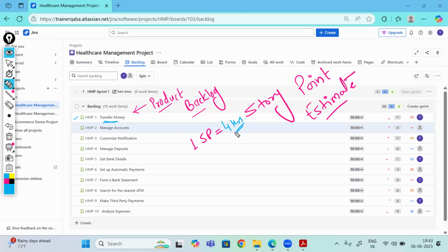So with this, how it's going to be up in here is one story point is 4 hours. So 7 as in 28 hours, which means to implement this requirement, all the efforts, design, development, testing, everything is going to take this.